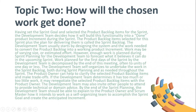Topic two: how will the chosen work get done? Having set the sprint goal and selected the product backlog items for the sprint, the development team decides how it will build this functionality into a done product increment during the sprint. The product backlog items selected for this sprint plus the plan for delivering them is called the sprint backlog. The development team usually starts by designing the system and the work needed to convert the product backlog into a working product increment. Work may be of varying size or estimated effort; however, work is planned during sprint planning for the development team to forecast what it believes it can do in the upcoming sprint.